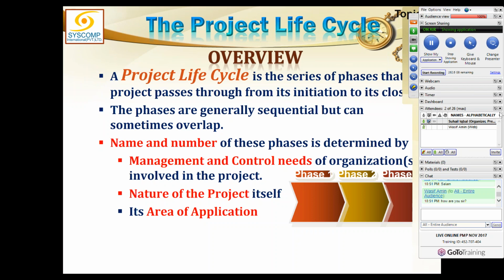Whatever you are creating, whatever the project is, you should focus on the work of the project. You should divide your project into major parts. Another interesting thing was you said financing. Financing could be a continuous process, or maybe you are just mentioning you are organizing the financing, mobilizing the financing, or something like that. That could be all right. But if it is a continuous process, the financing will keep coming. Remember, the phases you devise should be such that, if possible, they should not overlap. That is the best way of doing it.